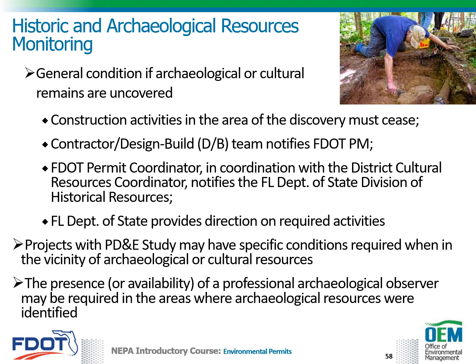The contractor or design-build team notifies the FDOT project manager. The FDOT Permit Coordinator, in coordination with the District Cultural Resources Coordinator, notifies the Florida Department of State Division of Historical Resources, and the Florida Department of State provides direction on required activities.